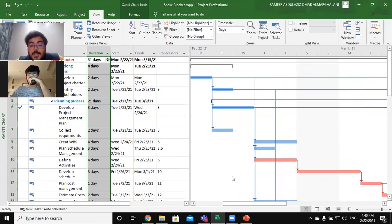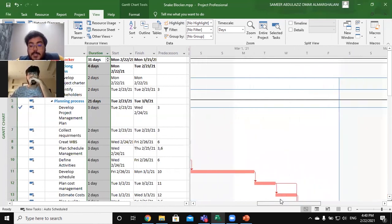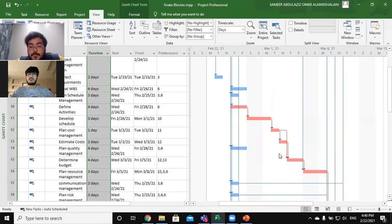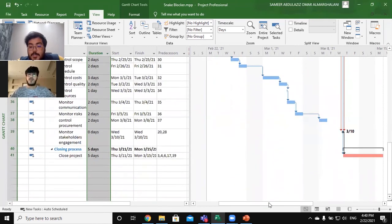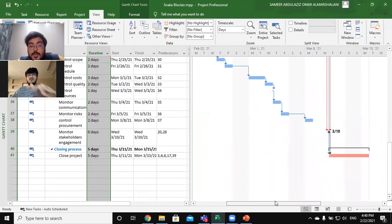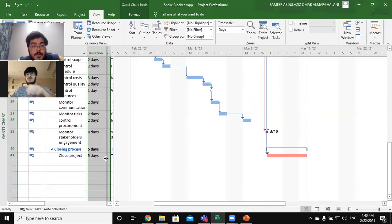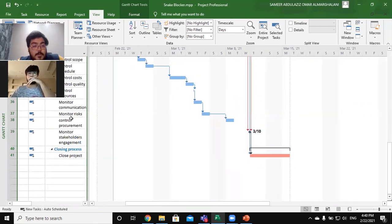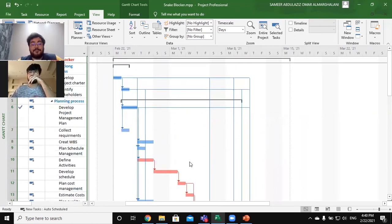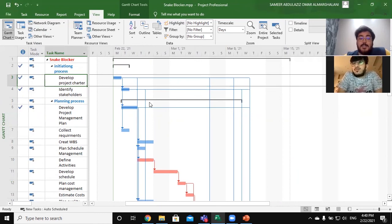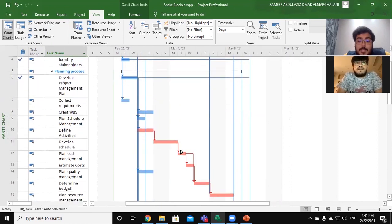Now let's move to the Gantt chart view. Here is our Gantt chart for the project. Let's zoom in. The 'Develop Project Charter' is the most important task because many other tasks depend on it. For example, 'Identify Stakeholders' depends on it. As you can see, an arrow goes from 'Develop Project Charter' to 'Identify Stakeholders,' showing a Finish-to-Start relationship, which is the first type of relationship.